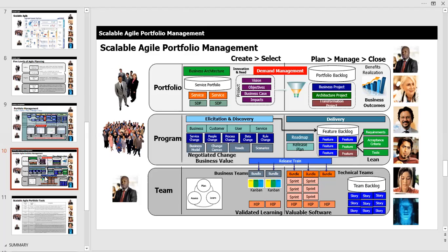Then you might go through and do some analysis against that. If you had a lot of those projects already in your portfolio backlog that you've done in the past, you could build parametric estimates from that portfolio backlog that would then help you come up with future features that you might need in your solution.